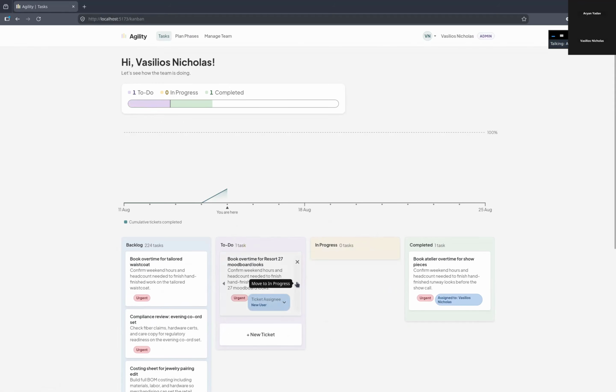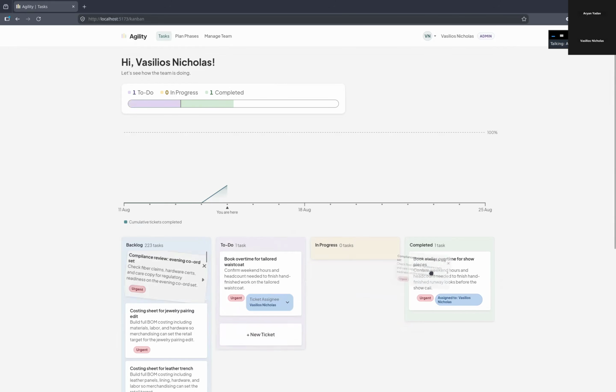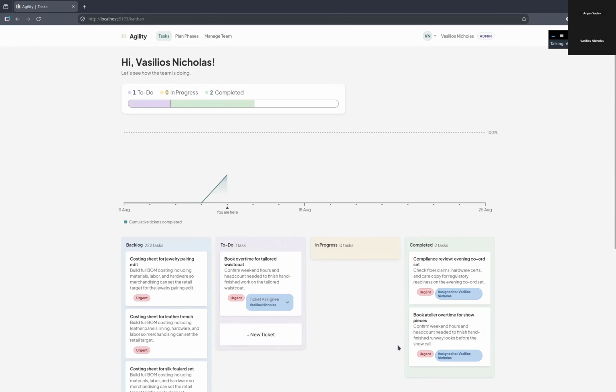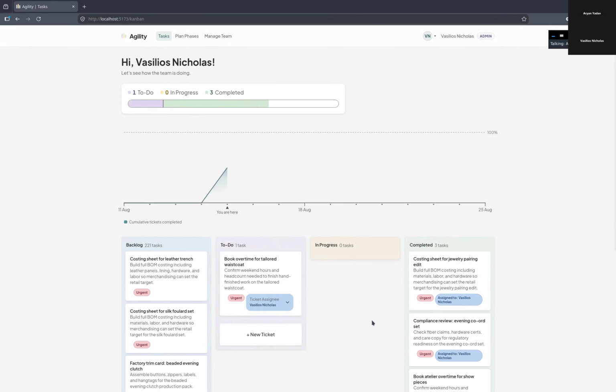The manager also has access to the X button, which lets them remove a ticket, which the normal developers can't do. The burn up chart in the middle of the page shows the progress for this phase, which helps the team align their goals and see how the rest of the team is doing, as opposed to pointing fingers at specific people. The bar up top shows the progress in a much simpler way.